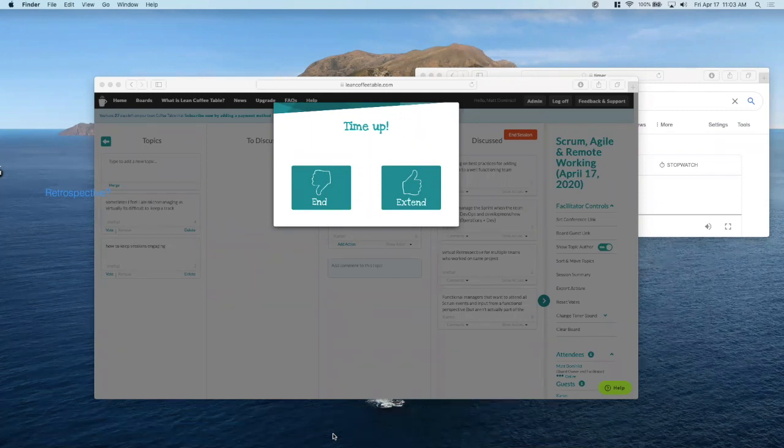Maybe it is about revisiting the definition of done. Yeah. And the definition of done applies to each item, not just as a whole, but to each item. Will this item be completely tested in staging and ready to be shipped at the end of our sprint? And then looking at the next one and going, okay, so in addition to this number 1, will number 2 meet the same criteria? Right. And it might be that they take in less work for the time being, but as they get better at doing it, their velocity ends up picking up again later.